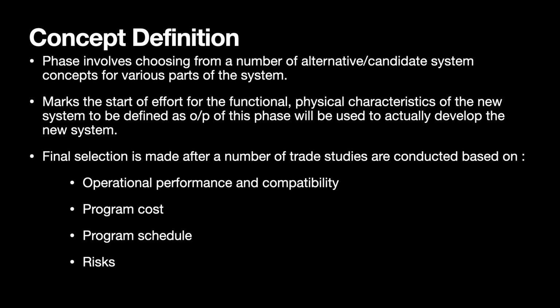The system development phase will use this to actually develop the new system. To make a final selection, a number of trade studies need to be conducted amongst all the options to assess the relatively better option based on operational performance and compatibility, program cost, program schedule, and risks.